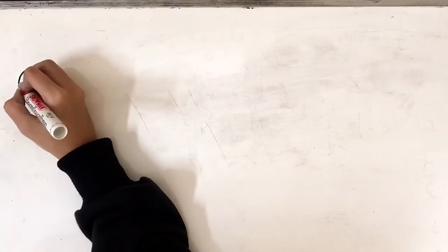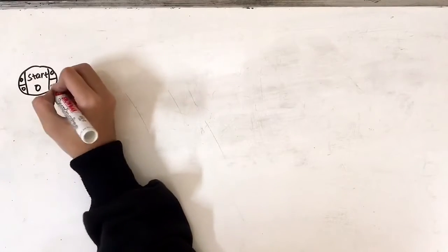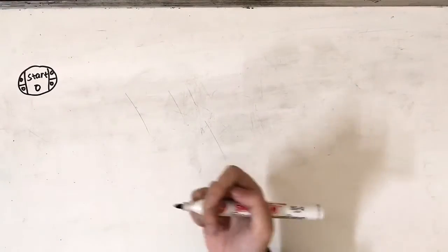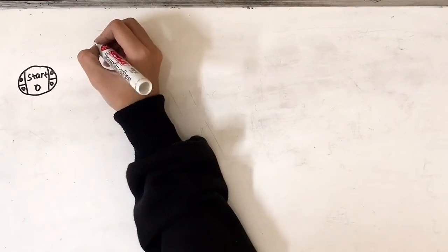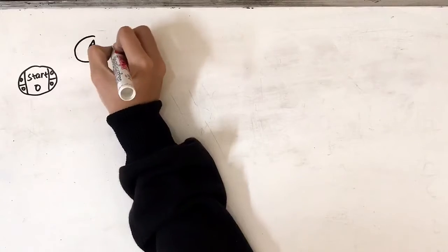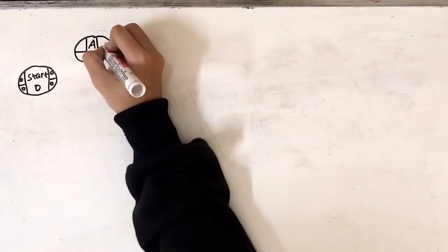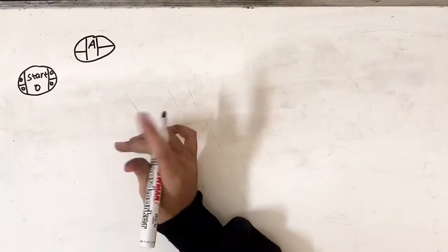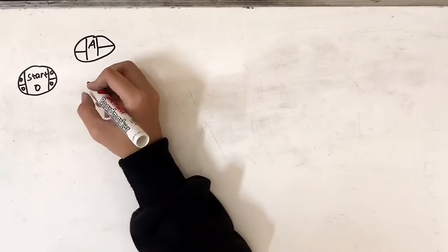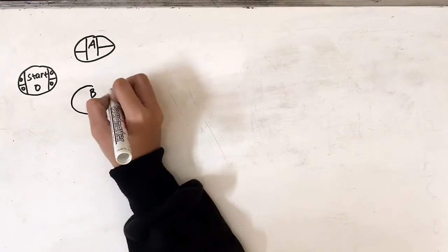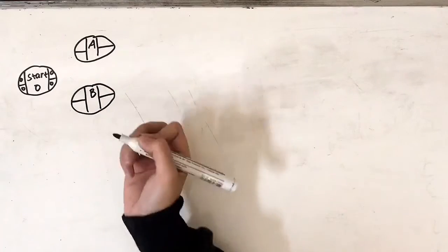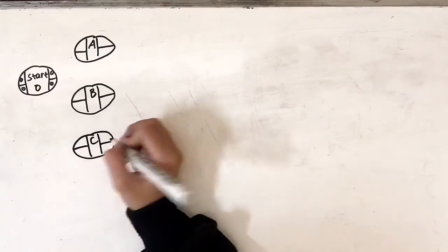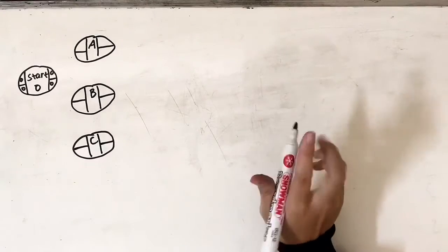I'm sorry, in problem 1 I didn't draw this before the first activity, but here I try to draw the start, and then we first draw activity A. Okay, it doesn't have a predecessor activity, so we just put it after start, and so does activity B. It doesn't have a predecessor activity as well, and so does activity C. So we put A, B, and C after start, and they're not connected.